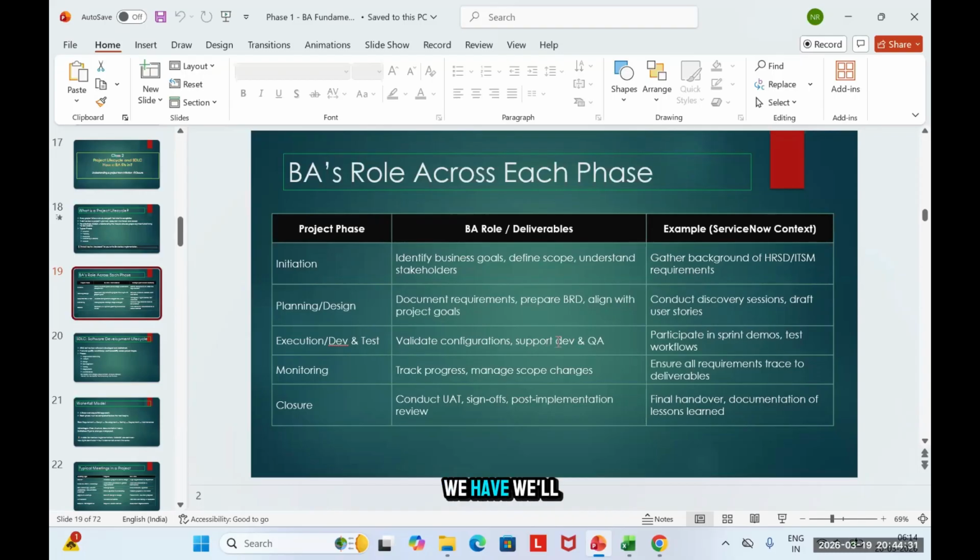For that, we'll divide our work into small chunks. Like we will deliver for the next 3 weeks. We are going to complete these activities in 3 weeks, then the next 3 weeks. So we'll divide our work into these small intervals. These are known as sprints.